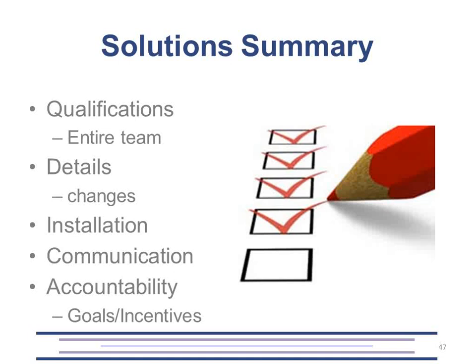So if an installer notices a problem, they shouldn't just take the design in their own hands. They should be accountable and communicate those issues back to the designer. And then those same designers need to communicate with the modeler so that everyone understands the energy impact of these alterations. Otherwise, it's no wonder that the prediction isn't going to meet the actual energy efficiency or performance.